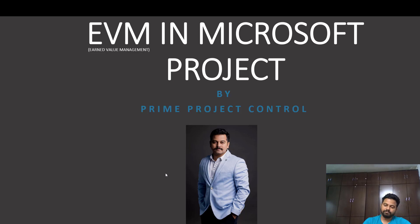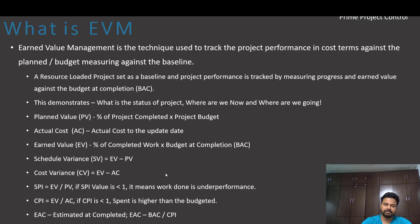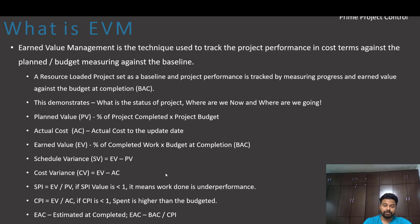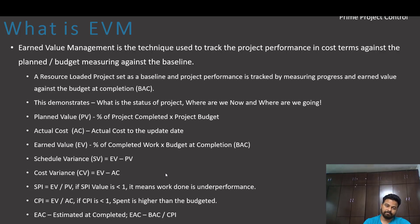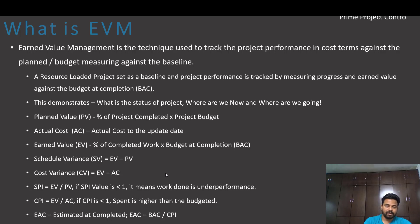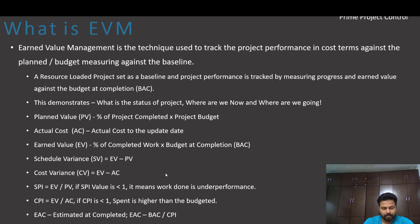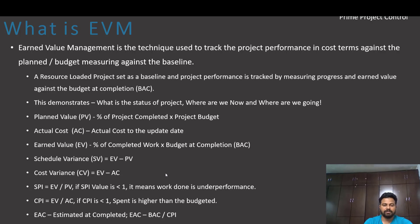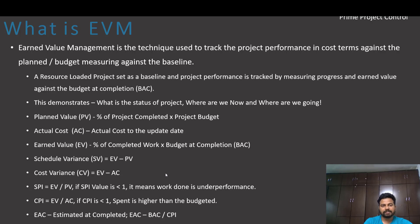So in order to track this we will carry out Earned Value analysis. It's a project control tool. Earned Value Management is the technique used to track the project performance in terms of cost against planned budget, which is measured against the baseline. Basically a resource loaded project is set as a baseline in the program and project performance is tracked by measuring progress and earned value against the budget at completion.